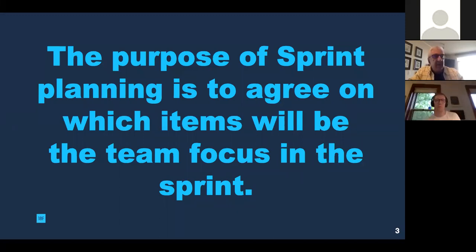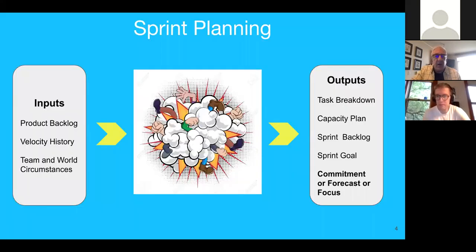And a quick reminder, because it's a subtle nuance that people forget, so I'll probably try to mention it every chance I get. This is a self-organizing team. No one is in charge, but rather than turning into anarchy, it turns into a situation of shared empowerment and shared responsibility amongst the team. When there's no one pointing at people and giving orders, you all have to agree on what's going on. And we start doing that for a 2-week sprint by agreeing on the stuff that the team is actually going to work on. It's a very simple process.